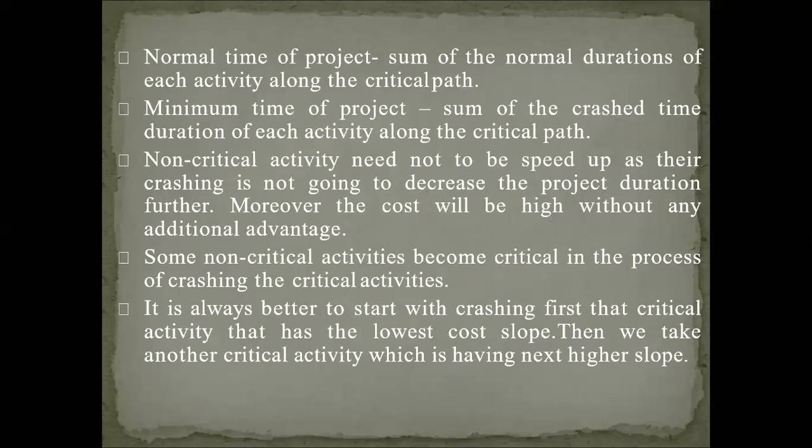Initially we are crashing only a single critical path, but due to that reduction of the dates of the critical path, two or more critical paths may be observed in the project. Then all critical paths you require to crash for further calculations, and that will increase your confusion. So at the same time we have to go for crashing of both the critical paths.